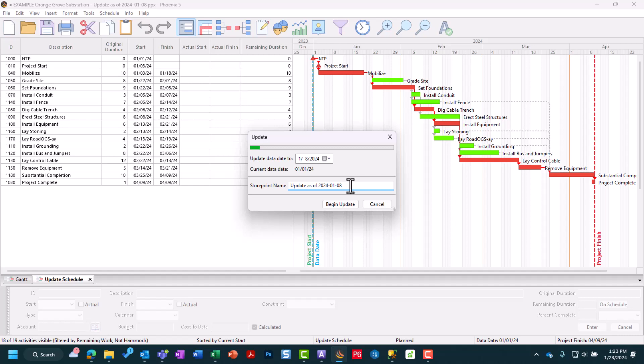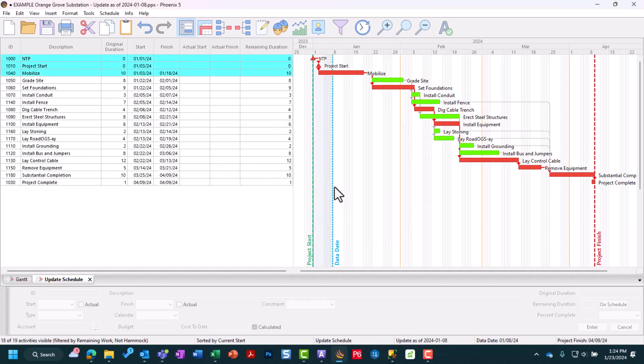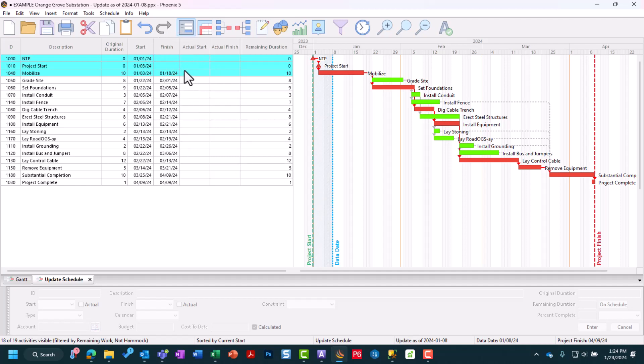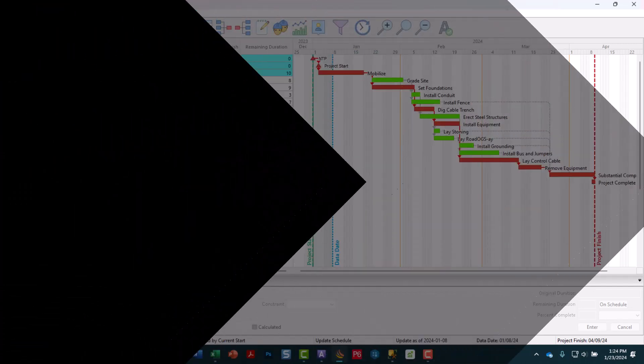You can name the update as of the date you're doing it. Then we can hit Begin Update. It's going to create a curtain for us from our project start to our data date. This is our first update, so the curtain starts from the beginning. Future curtains will begin based on whatever your last update period ended on. It's also going to highlight our activities in the activity table in blue so we know exactly what to update. This is why I sort by start date ascending, so I have everything in a nice waterfall to start updating.